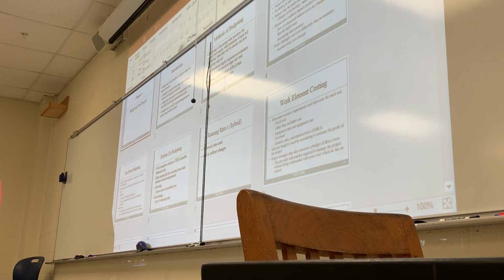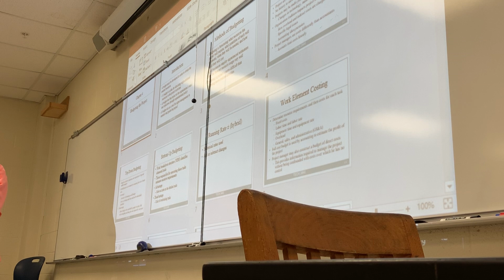I'm going to give you a project action plan. It'll be in Excel. Your job is to read it, interpret what are level 1s, level 2s, and level 3s. It will also have you add a beginning and an ending milestone, as we've talked about all along. So you're going to have to do some modifications to the spreadsheet before you copy and paste. You'll follow the steps that we have used for both of those.